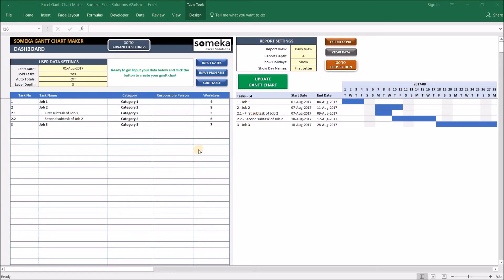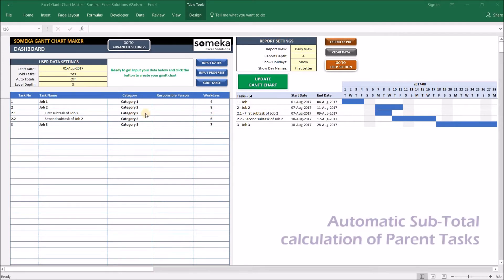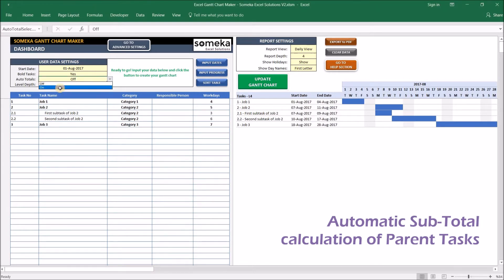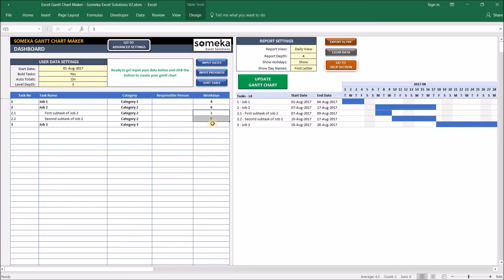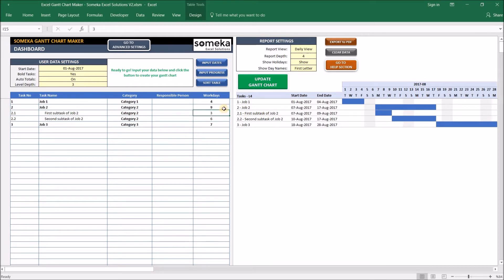One thing you may notice here is the total duration of the second main task is not the sum of subtasks. Some people prefer to create with this freedom, but if you want totals to be calculated automatically for main tasks, you can turn this feature on—the Auto Subtotals feature. So let's update our Gantt chart. Now you see the main task duration is now equal to the subtask duration totals. Note that when this feature is active, it automatically changes values to keep the logic legit. So even if I change the duration here—let's make it three—as you see, it reverses it back. If you don't want this feature and want full freedom, you can anytime turn this feature off.